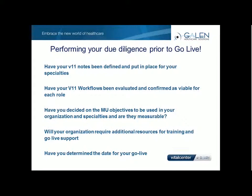The second reason we hire trainers, or a bunch of them, is go-live training itself. Go-live training is usually 1 or 2 weeks before go-live day, and this training is intended to help the users retain their knowledge versus losing it if they don't use it immediately. So we recommend that for classes right before go-live, let's say you have 2 weeks, keep your classes really small so that everyone gets the most out of them, and have a bunch of them going on at the same time. In other words, if you had 6 trainers and they each train 5 people at a time all day long in different training rooms, you're going to be able to knock it out and afford these users the ability to retain that knowledge. So what I'm trying to stress here is training is big. You're going to have to consider resources for that.